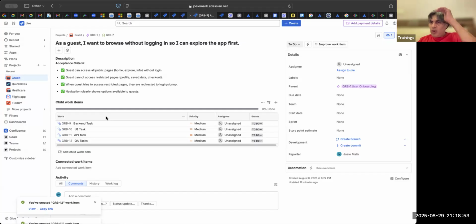In fact, if you have only a UI task, that's not even a complete functionality. What are you going to show? A simple form, no backend? That doesn't work like that. So in Agile, you will always have all the layers of a functionality. There are 3 layers minimum. It could be nth layer, it could be 2 layers also, but there are different components to building a functionality. So you must always have 2 or 3 layers. All the layers should be within that story because you want a completed functionality.